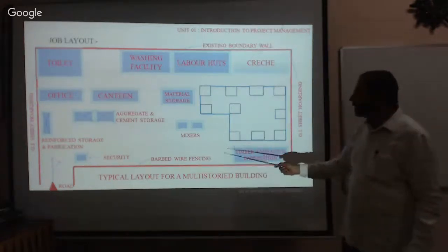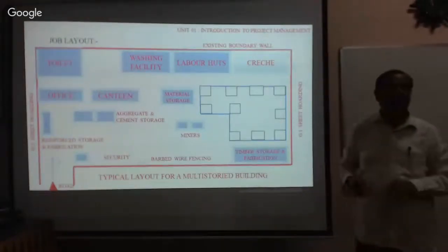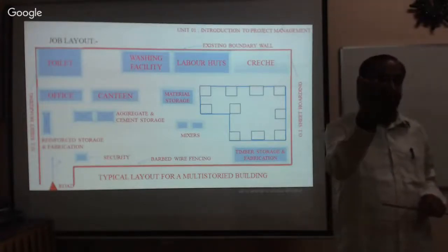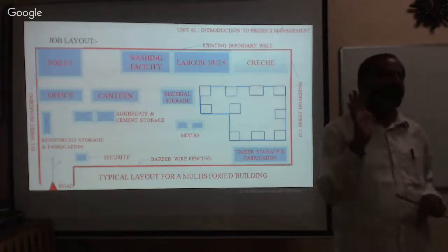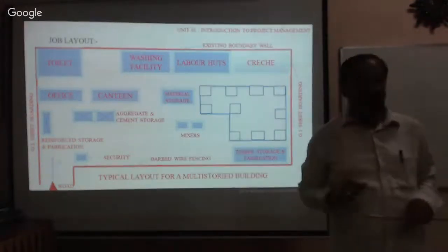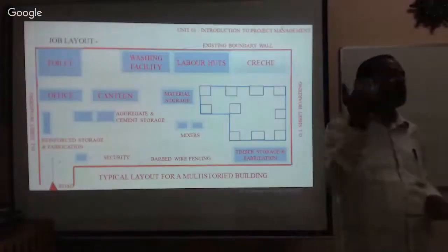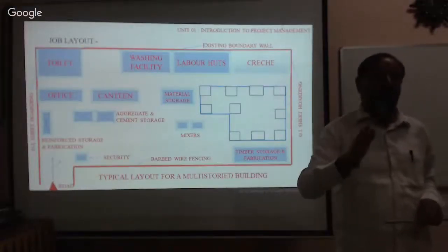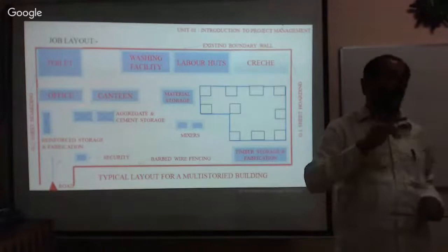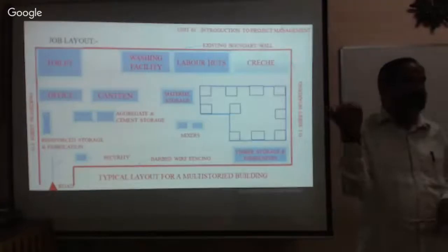Similarly, first you have to locate where you need to construct your project. Sometimes in the construction of houses, only small land is available. Everybody dumps the material on the road, and every time it disturbs the people. Once the rainy season commences, your material is carried away with the rain, and the drain is closed, isn't it? These are the disturbances. Therefore, whether it is a small project or a bigger project, whatever the size, we need to address this issue in the beginning itself.